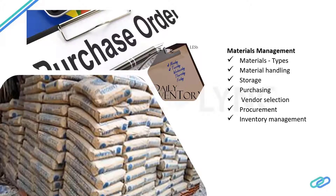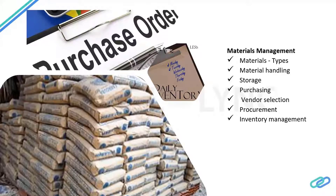Purchasing involves knowing which materials are to be bought and who the potential vendors are in the local market. It is suggested to source materials from local suppliers to reduce transportation costs. Procurement is also a very important aspect of material management — you need a plan for where, what, and when materials are to be procured. All of this is included in inventory management.